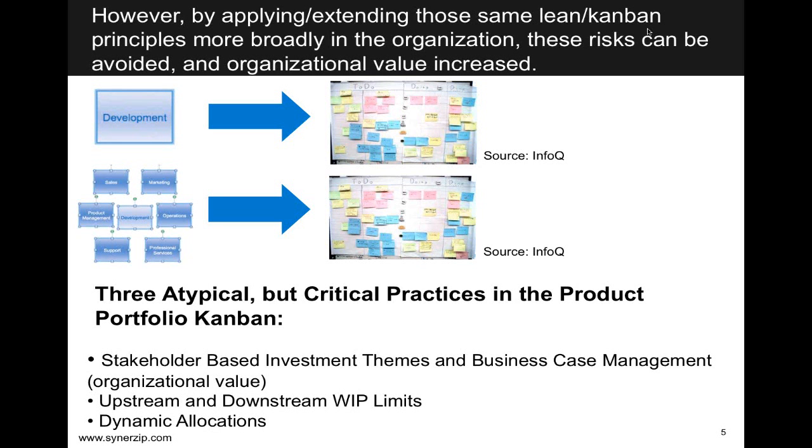The second is how you can lay down a set of Kanban states or stages on top of your organization, and then enforce WIP limits to help provide some relief to the parts of the organization that are melting from development performance related issues.